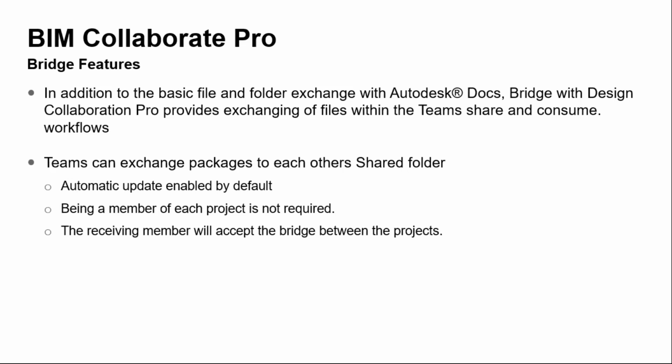In BIM Collaborate Pro, the project admin sends a request to the project admin on another project requesting a bridge between the projects. The project admins do not need to be a member of both projects like we had in Autodesk Docs.